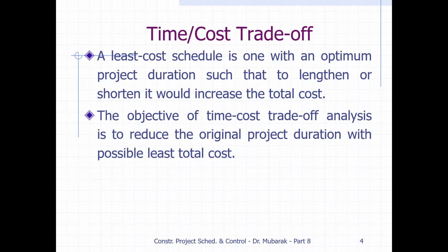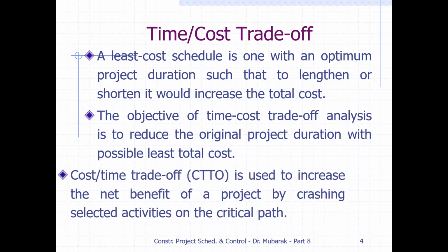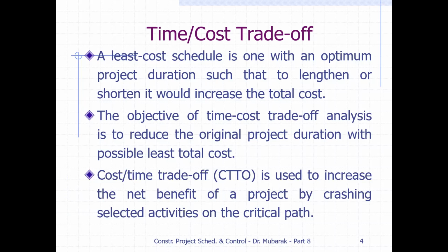Okay, so we are going to find the duration of the project where we can complete the project with the minimum total cost. A cost time trade-off is used to increase the net benefit of a project by crashing selected activities on the critical path.